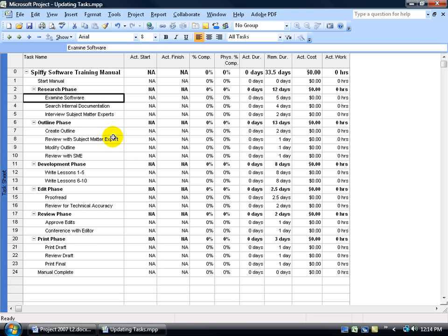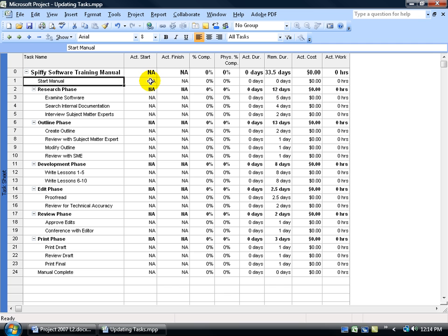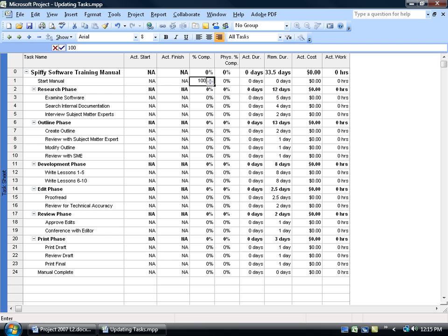Now in all simplicity, when you want to enter in the progress of a task, for example like starting the training manual, if there hasn't been any change in the Actual Start dates or Actual Finish dates, in other words we're on target, they haven't started any earlier than what we planned or any later, then just come over here and keep it really simple and type in 100% when it's complete and hit enter.